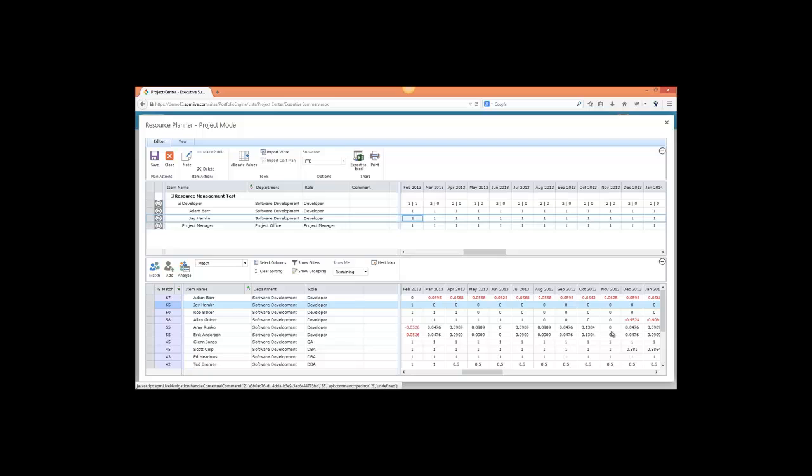And this availability here, though, actually does calculate time off. It calculates any other projects that they're working on. This is an availability based on work hours, FTE conversion ratios, holidays. It takes all of that into account to get this remaining availability. So you shouldn't be using anyone who's not forecasted as available for that particular time period. So all of these resources have already been entered into the EPM Live system. They've been associated to a specific holiday schedule and specific work hours, etc. And it's using all that information to generate this remaining availability picture here.